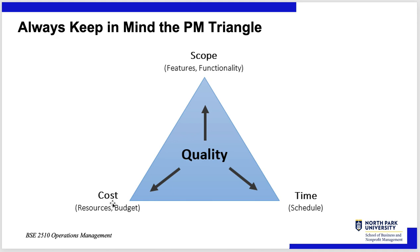If cost is the most important constraint, you trade off time or scope — and mostly scope suffers. For example: it looks like we're going to go over budget. If your manager says you're fired if you exceed $5 million, you tell them: because of things learned along the way, we're not going to deliver features X, Y, and Z, and we'll delay by three weeks — but we'll be within budget. Are you okay with that? That's how those conversations go in great summary.